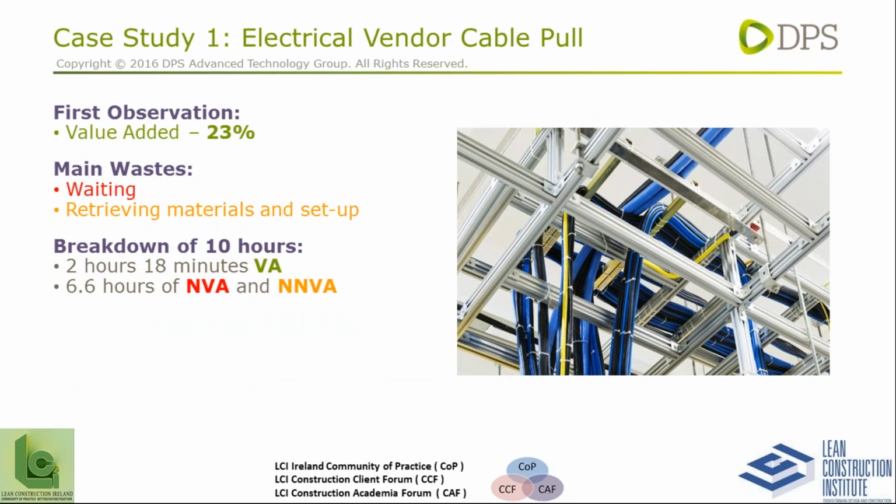Upon our first observation, we observed a value-added percentage of 23%, and the main wastes that we observed were waiting and retrieving materials and setup. Waiting was down to a misalignment of start and break times. When that was fixed, we really saw a beneficial output from that.